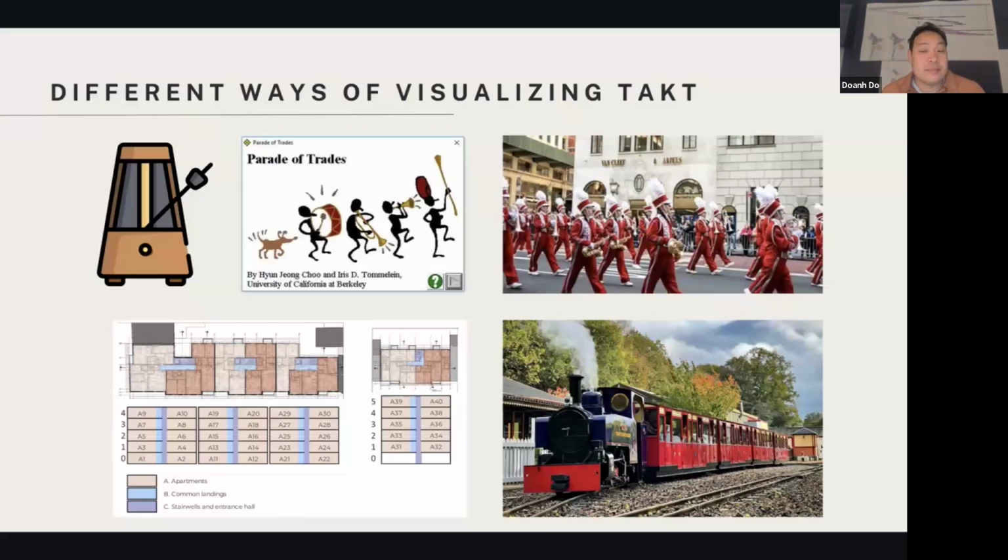And also, not everybody wants the same level of transparency. And also, if you think about takt, if you have the trades all with lump sum contracts where they don't communicate and they don't have a big room, they don't collaborate, you can see why you can't get takt. You can't get the entire trades to collaborate. Because if one of the wagons doesn't want to follow the process, you've got nothing.